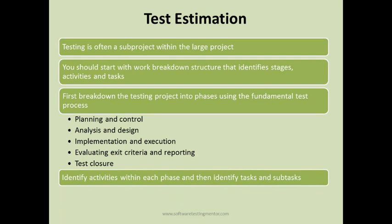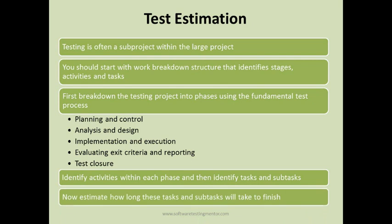Then identify what the activities will be within each phase — for example, what activities fall in the planning and control phase, and what activities fall in the analysis and design phase. Then identify tasks and subtasks for those activities. Once you are done identifying activities, tasks, and subtasks, you can estimate how long these will take to finish. This is the right way to do test estimation.